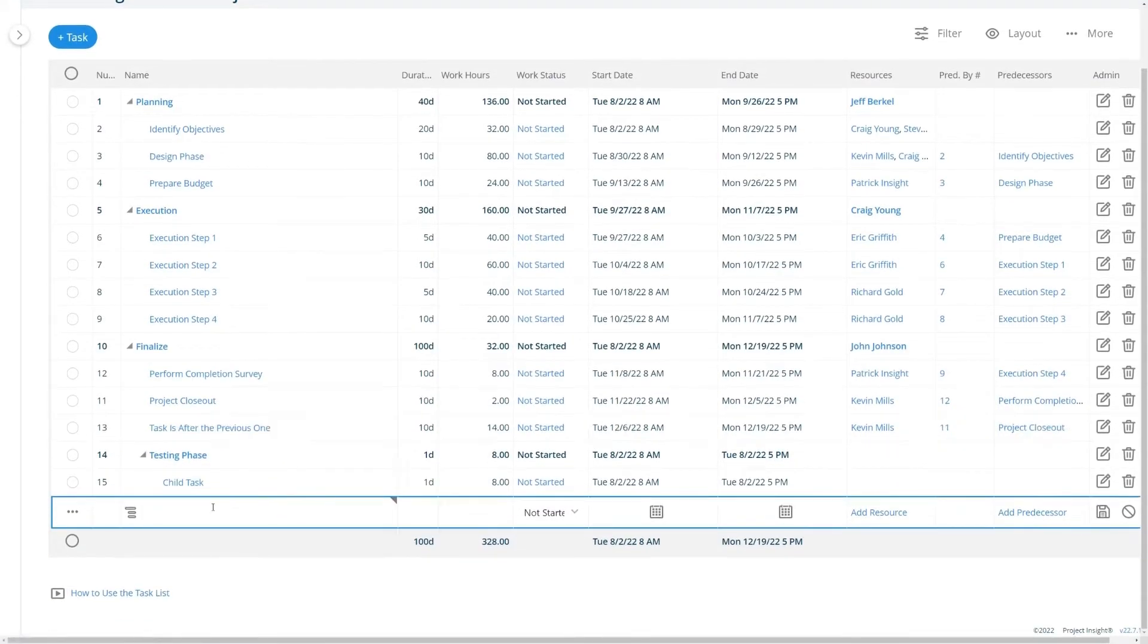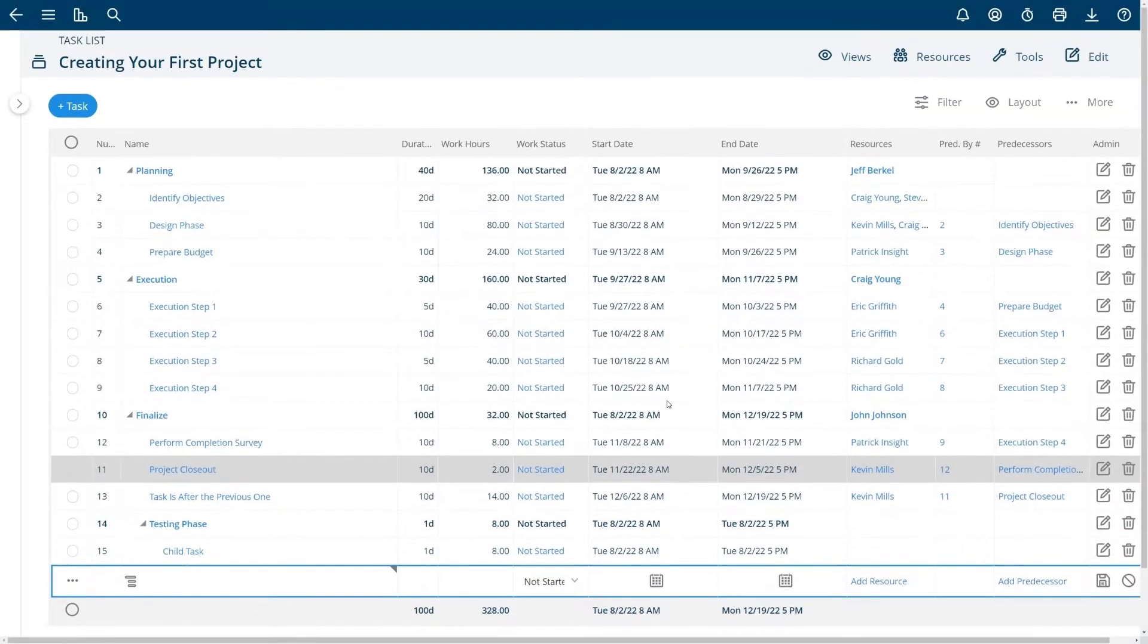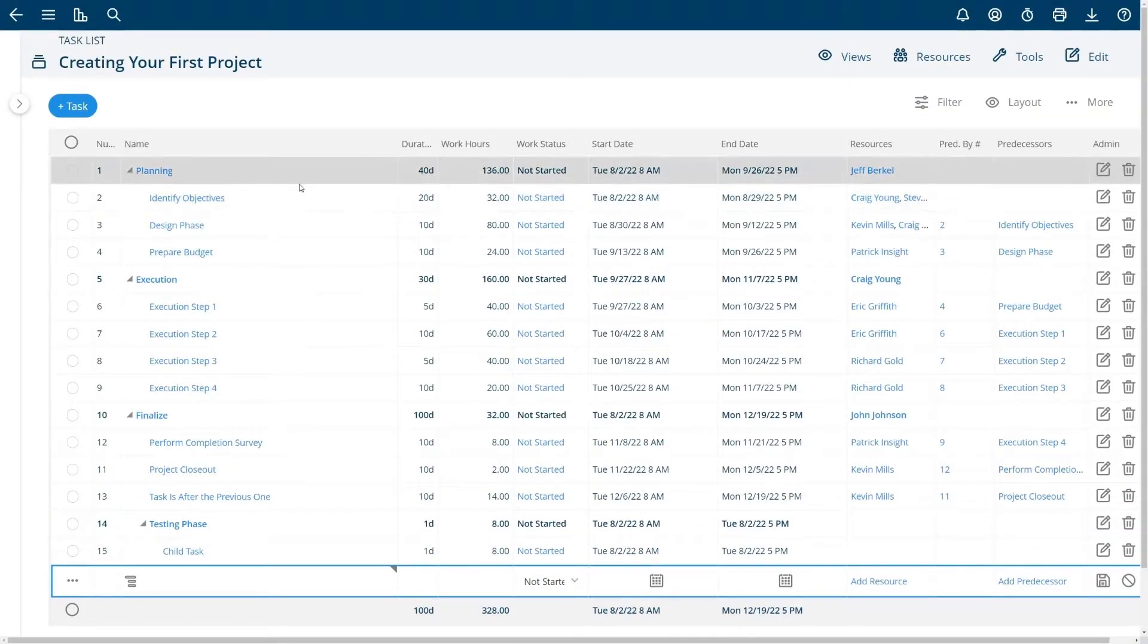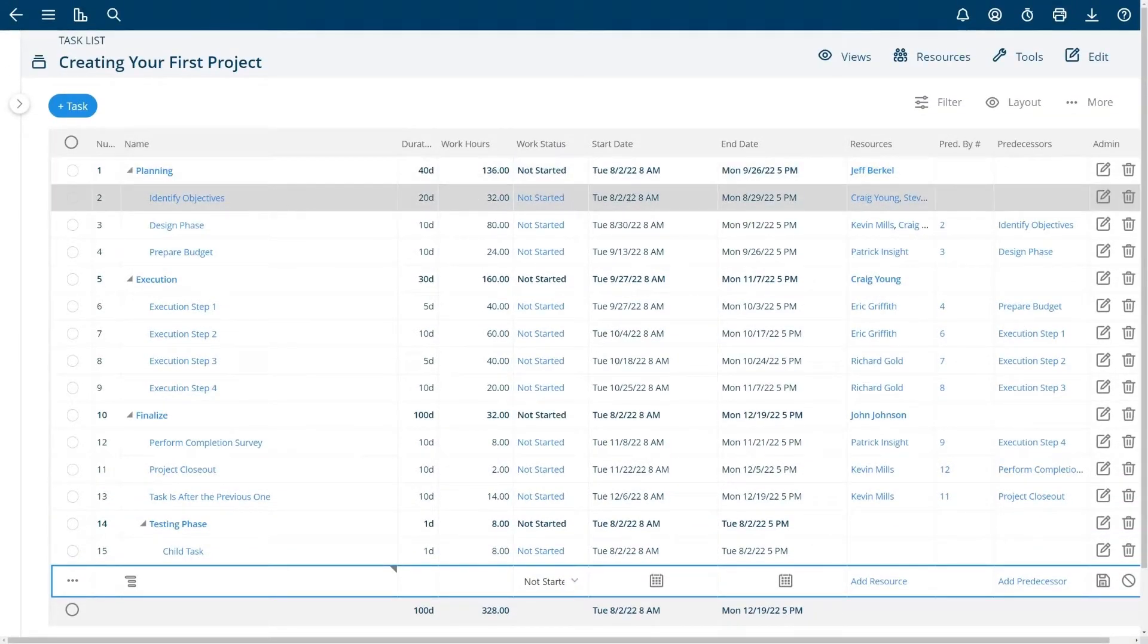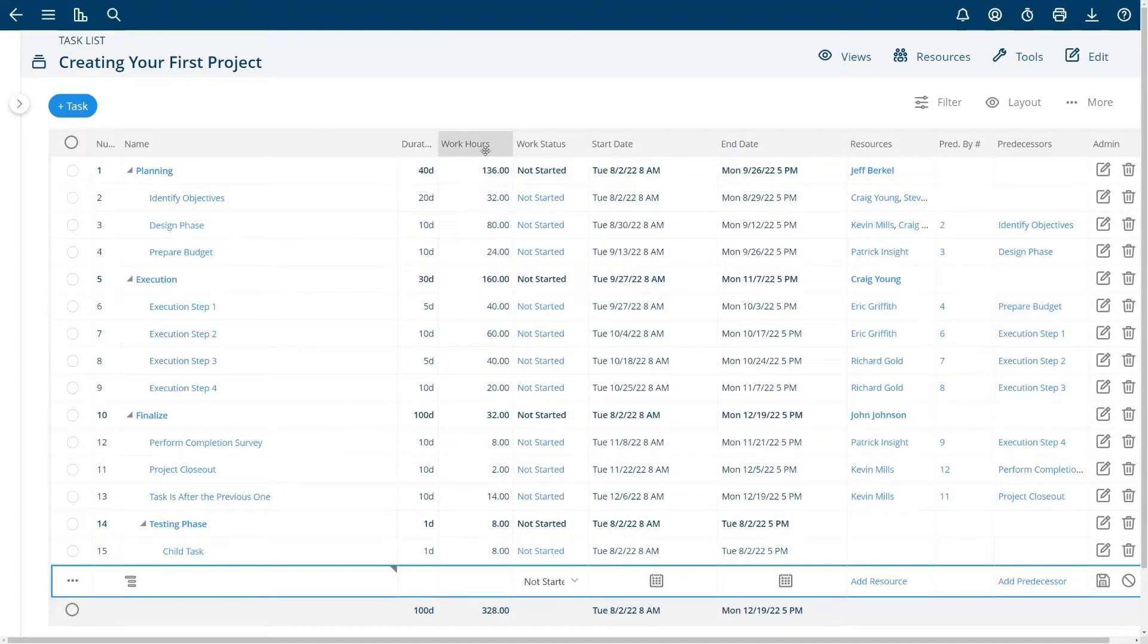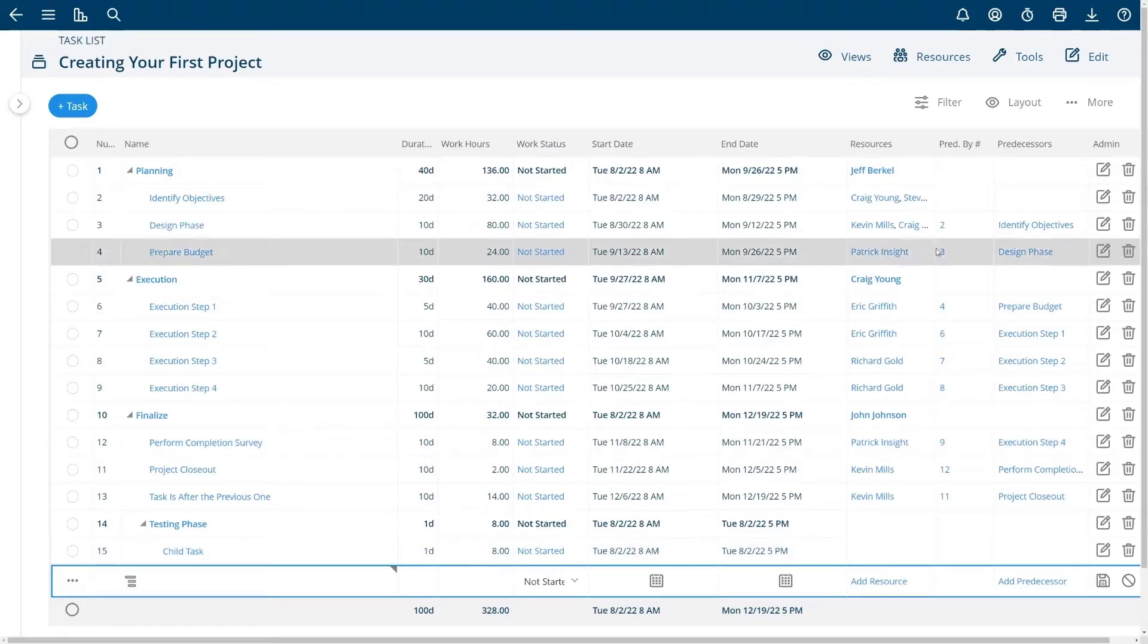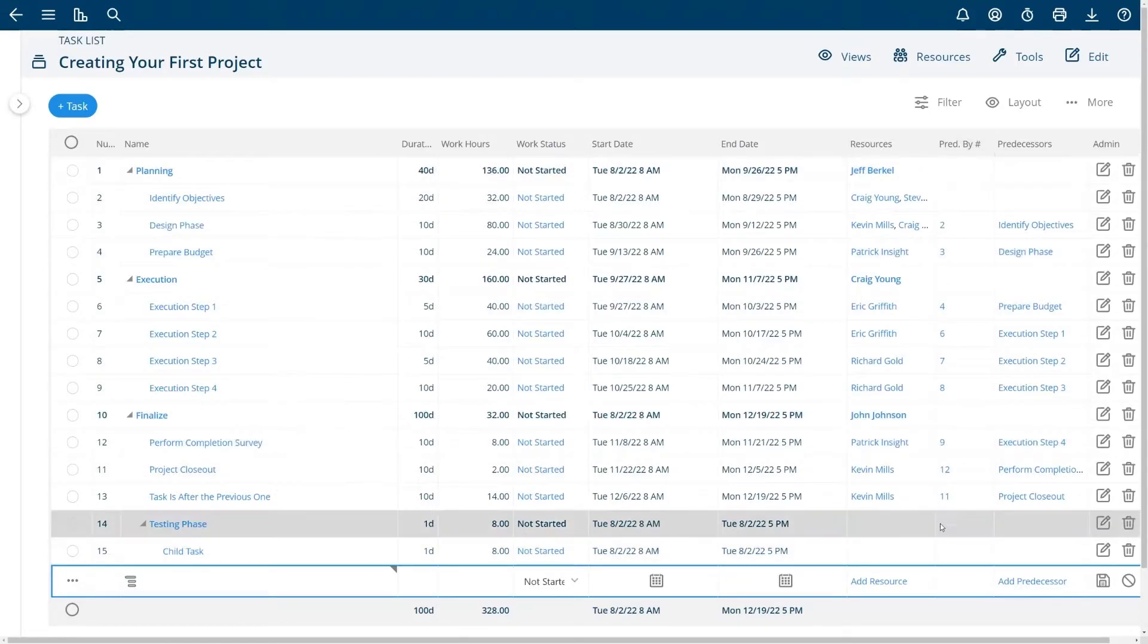At this point I'm going to talk a little bit about intelligent scheduling. Project Insight has an intelligent scheduling engine which means that task dates are calculated based on the duration of the task, how many hours the task has to do, and any predecessors that you have created for the task.